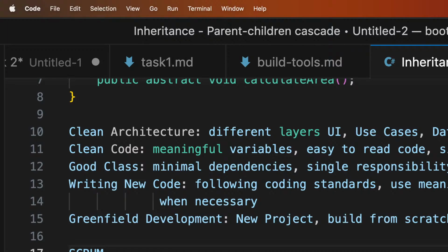And for an agile environment, something that is core to it is Scrum. So you can have Scrum sessions. Scrum has to do with discussing different issues or needs per project. It allows us to break a project into multiple parts or steps, and then set the goals for what needs to be achieved within a 2-week period.